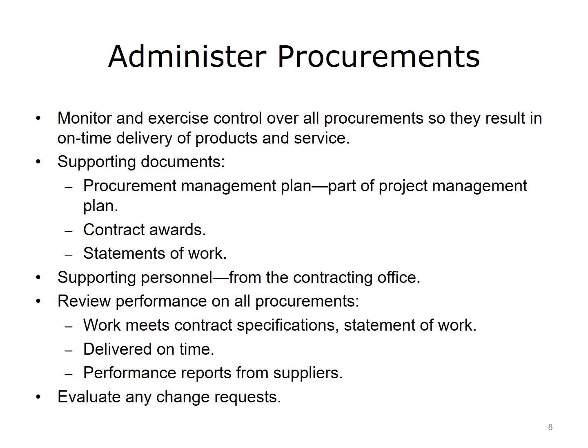You will also need to monitor procurements, which includes the various equipment and software and hardware products required to complete your products. Your overall project management plan should include a procurement plan that abides by the process required by the customer healthcare organization. These processes will affect your schedule in different ways. For instance, if it takes 6 weeks to receive a piece of hardware from a specific vendor, be sure to factor that into your plan. Update any changes to the plan and communicate these updates.